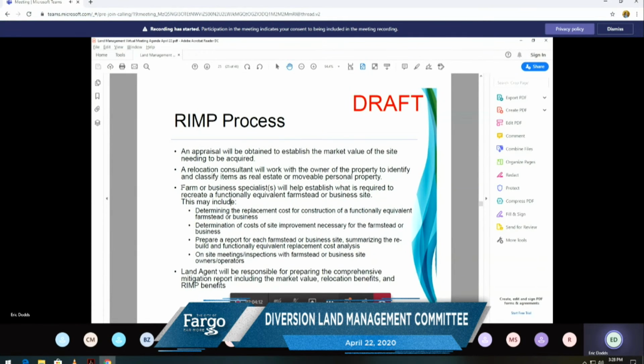We've also been looking into the extension information that's provided by other land grant universities, Wisconsin, Minnesota, et cetera. And we're starting to have some conversations with some of the farm building suppliers like Gateway Building Systems, Superior Grain Bins. They all supply this type of farm equipment, and we're going to be working towards building a rate sheet that would essentially identify what the costs of those components are, and then we can build up a cost estimate based on that rate sheet for each one of the impacted farmsteads.